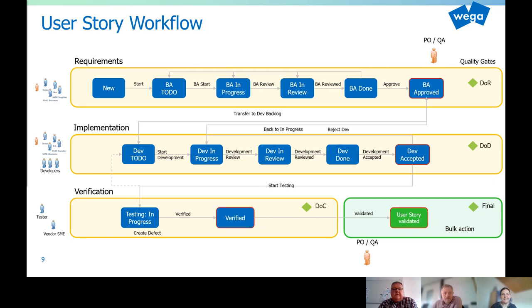Let me give you an answer, Andreas. Sure, we use a risk-based approach. We assess the risk for each requirement, or so-called specification item, directly in our tool. So first of all, we rate the business and the GxP criticality, and we document the risk category in the user story or in the specification item. So for example, is it a patient risk, a data quality risk, data integrity, IT security,